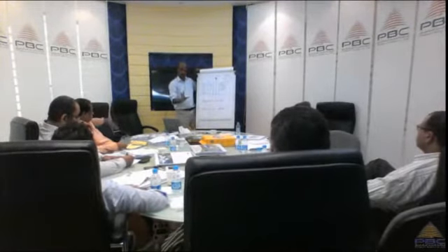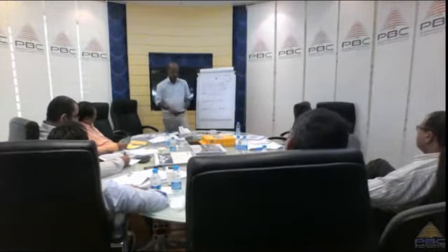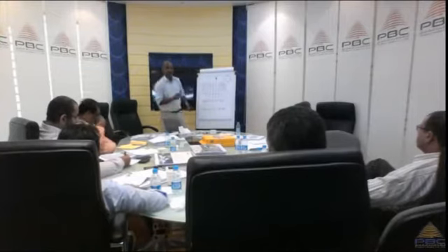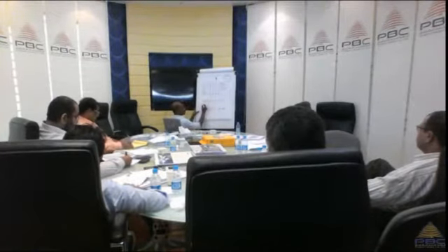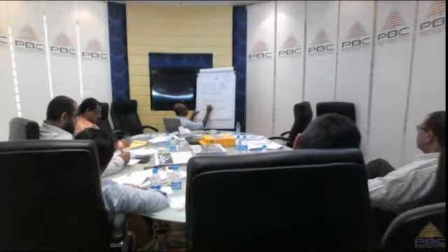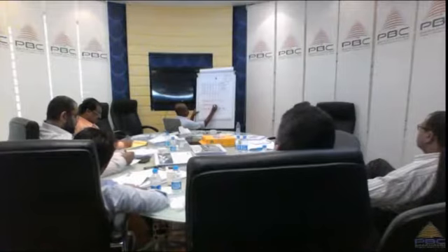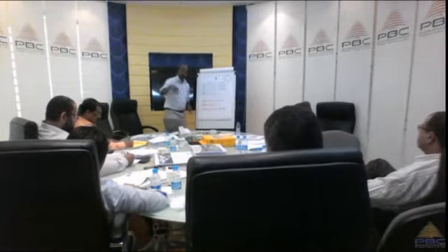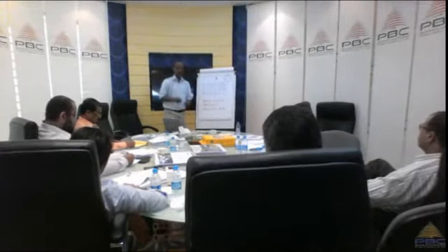Okay, exactly. So we have a value of $2 of work on the ground. We have one complete side, 75% of one side, 25% of the third one. So the total is 2. We call that the earned value. The concept of earned value means the value of work, or EV, that is actually created and sitting on the ground. And here in our case it's $2.